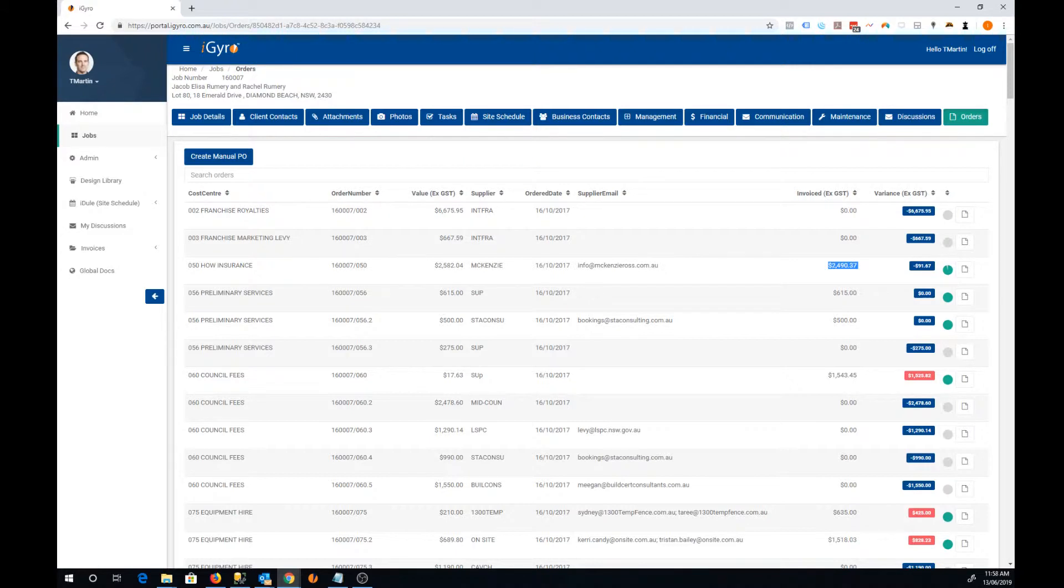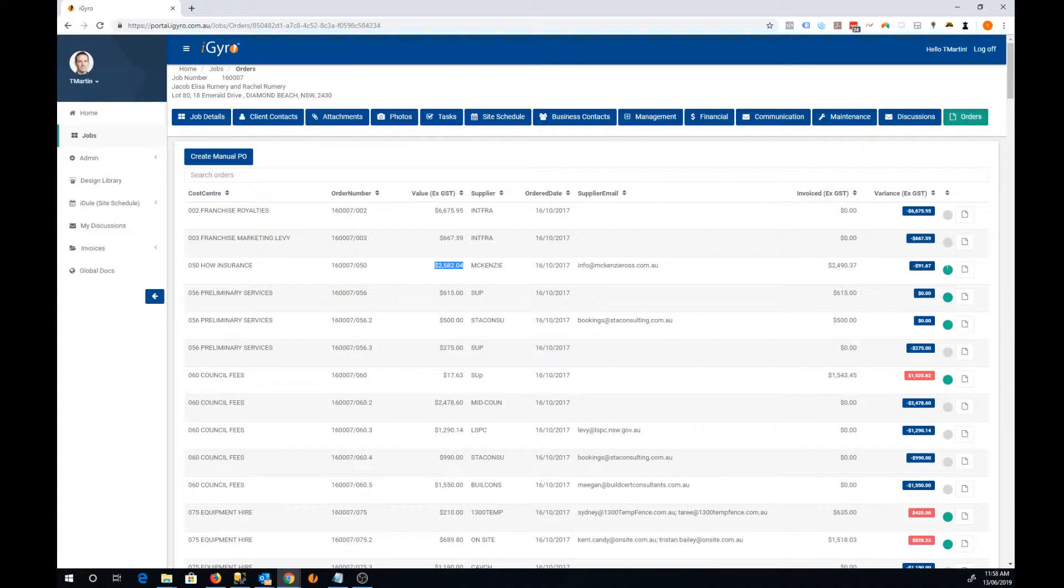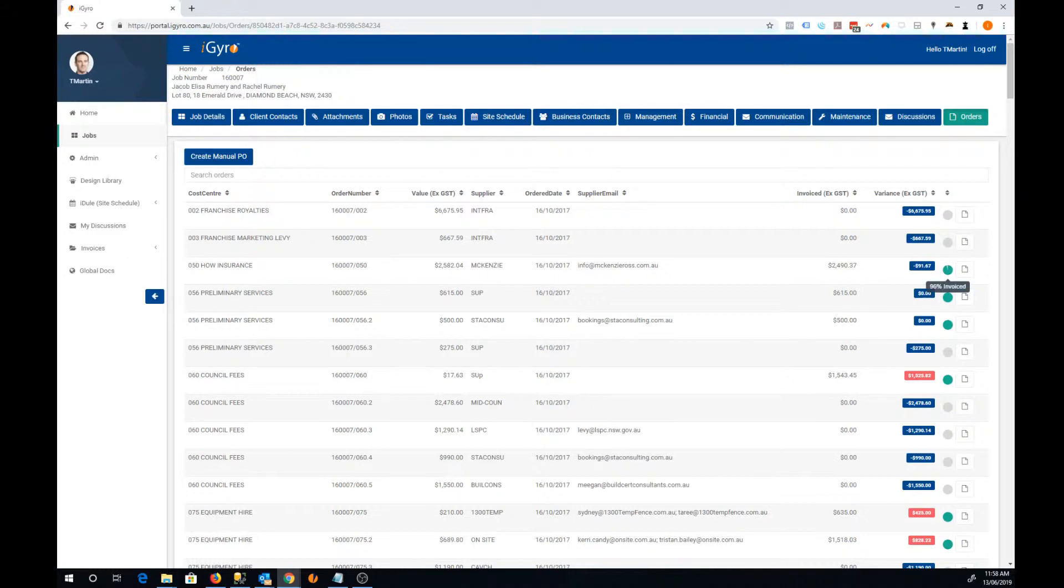The next column is the variance column and that will tell us the difference between the invoiced amount and the amount we actually ordered. In this case it's minus $91.67. And just to the right of that is a little pie chart that will give us a visual, letting us know that we've received 96% of the expected invoices for that order.